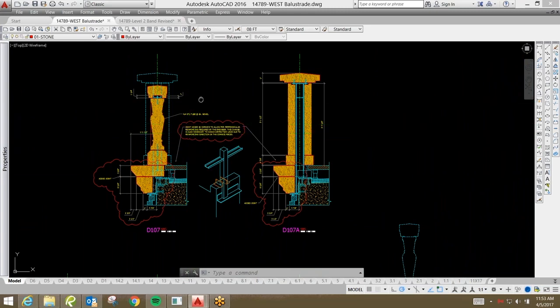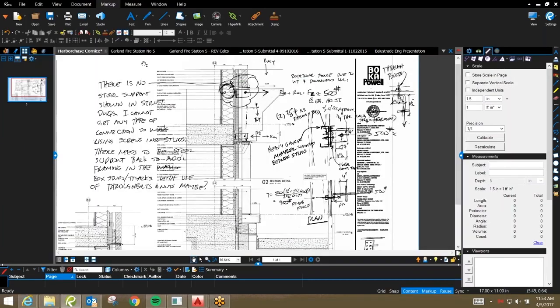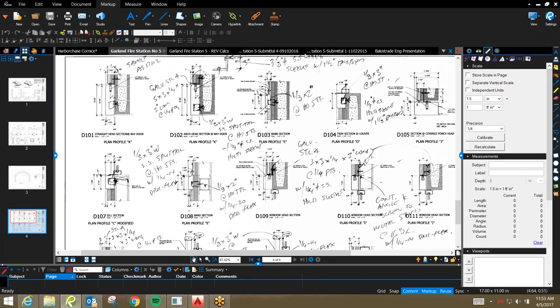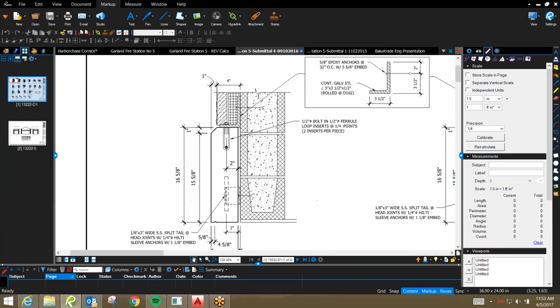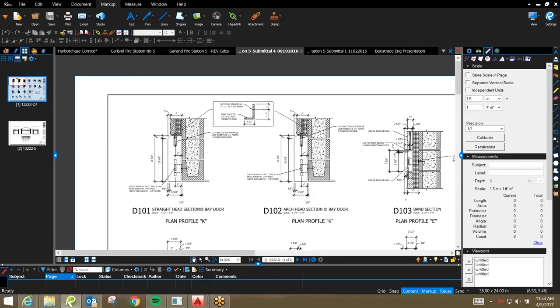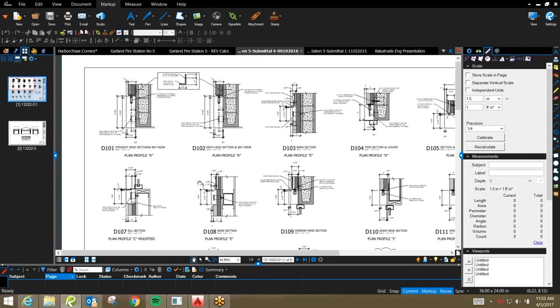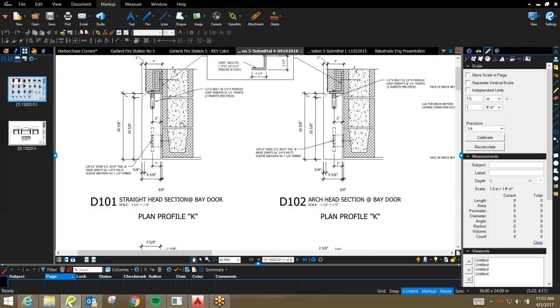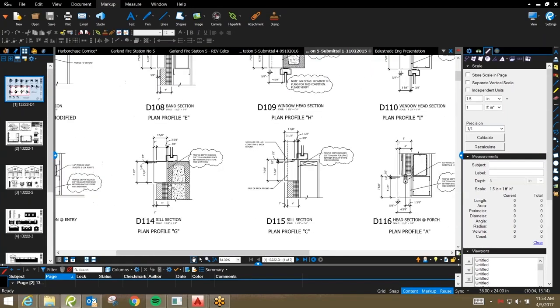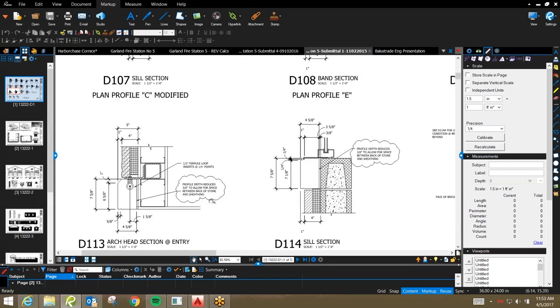Let's see, I'm going to go on to give you an example of a project that has engineering attachments. Now this project is one that required engineering. What I'm going to show you here is this is our first shop drawing submittal showing all of the cut sections. Now, oh, I'm sorry, this actually is the first submittal prior to the engineer looking at it. We will submit this to the architect prior to engineering the attachments. On our first submittal, we send our drawings without attachments.